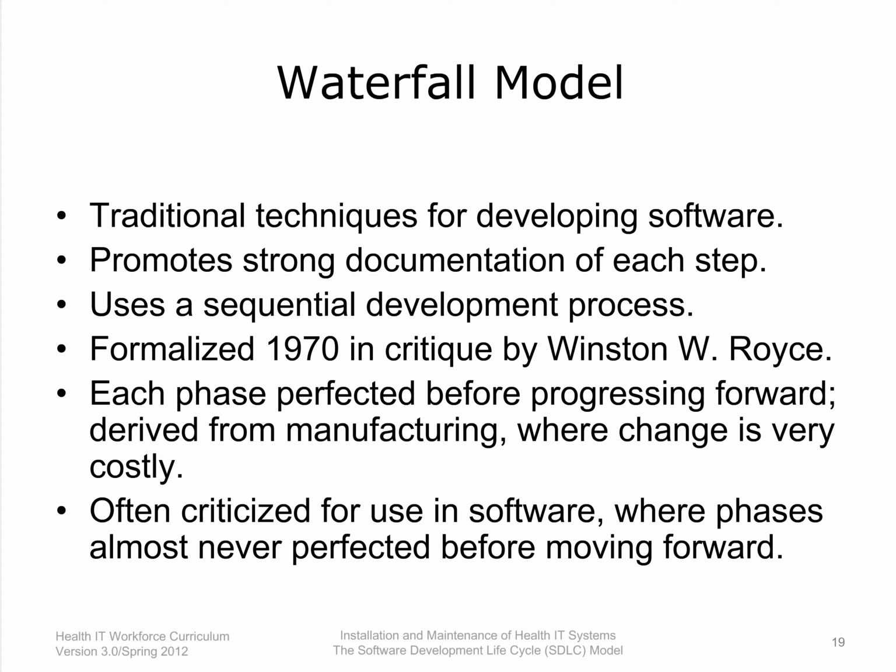The Waterfall development model is actually a product of the manufacturing and development industries, where making after-the-fact changes is often prohibitively costly. Therefore, progression to the next phase of development does not typically commence until the previous phase has been perfected and locked down. Many have criticized the Waterfall model, citing that it is difficult, if not impossible, to finish a phase of a software product's lifecycle perfectly before progressing forward to the next stage. To that end, several variations of the Waterfall model have been created to help address some of these issues.